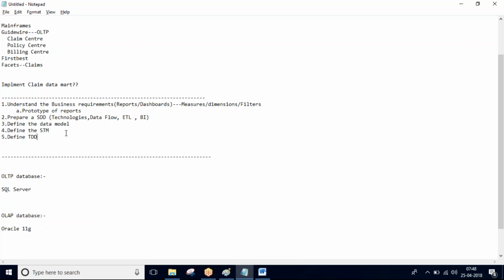For each user story you'll have a separate task, and for each task, the effort that is required will be built into a tool. For tracking agile project management we use tools like Rally or Jira, or you can even use HPALM. As a developer, when you start a project, they define what tasks are defined for you, the start date and end date, and how many hours you need to spend on that task.